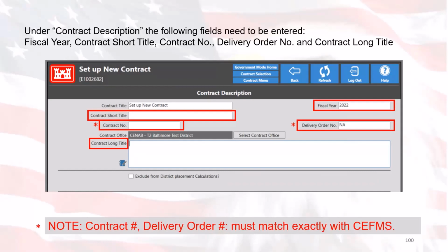Usually the contract number is broken up into several parts, and that's referred to as the DODAAC, the Department of Defense Activity Address Code, and it's usually segmented into the enterprise identifier, like the W912H9 or the other DODAAC prefixes, then the year, and then the procurement instrument code, which for most of these is C for contract, and then the serialized identifiers at the end. So that's usually how the contract number is broken up.